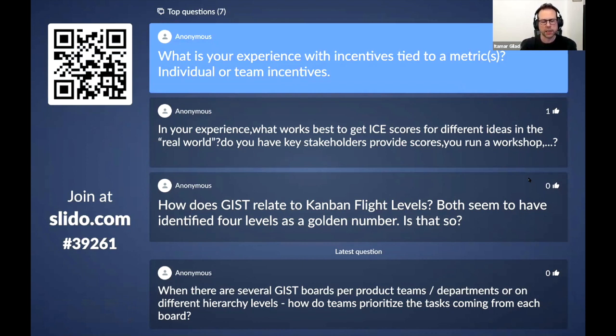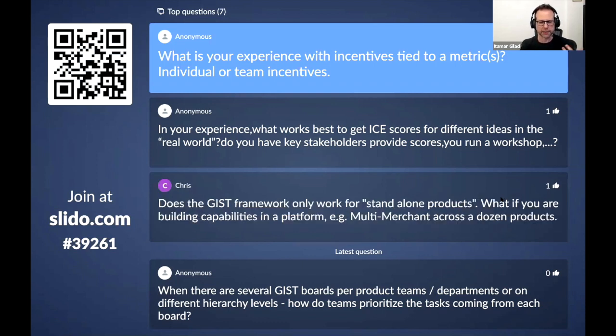So I have a set of metrics that I like to track in Gist, which is the number of ideas we test, the number of steps that generated meaningful learning, the number of ideas that actually got released. And I think these things create trends. We can track them and we see, okay, we started testing more and more ideas. That's a positive. The team that is actually able to test more ideas is usually in a better position to succeed more. We managed to gain more learning.